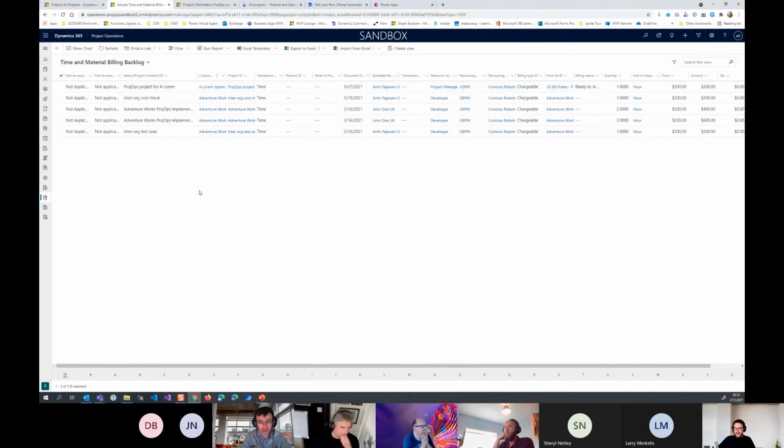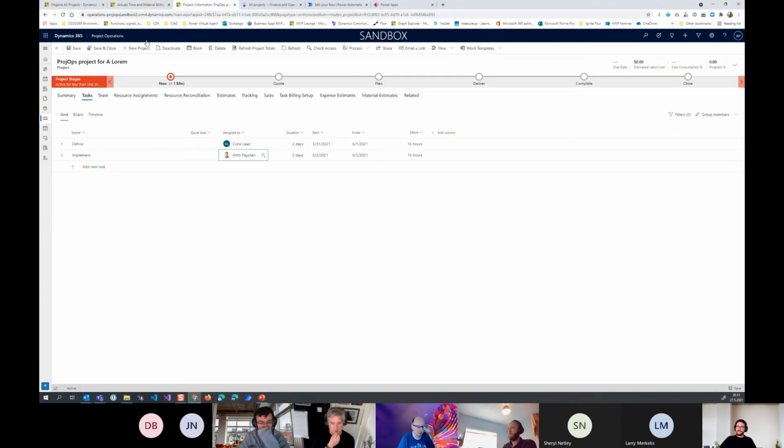So I'm going to group the backlog and say it's ready to invoice. After I've done that, I would have two options: automated invoicing based on what are called invoice schedules, or manual invoicing from the context of a project contract. Those schedules are, I call them level 400 stuff. They're fairly, in my opinion, complicated, level 300 at least. So we'll just show the manual invoicing. Now that the time has been submitted and approved, and the backlog has been groomed,